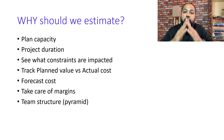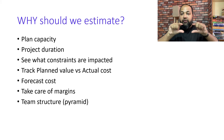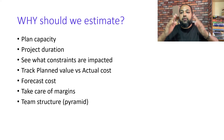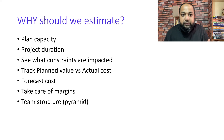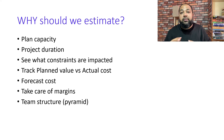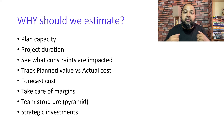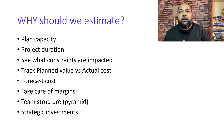Estimation helps us plan a good pyramid team structure — at the bottom you have junior resources, then people with four to five years of experience, then a couple of seniors, then a manager or lead. We need this structure to get better margins; you can't have all people with ten years of experience as they'll cost too much. Sometimes we also do strategic investments, and for that estimations help as well.